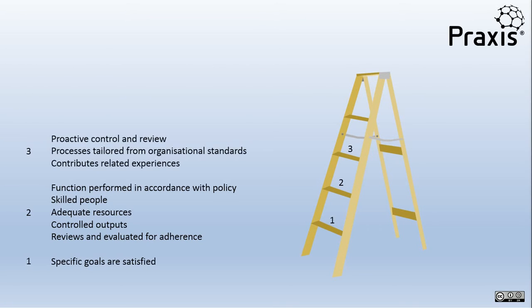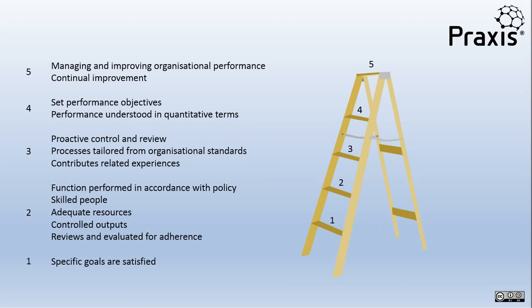At level 3 your management approach is more proactive. You will be adapting to different contexts and collecting lessons learned. At level 4 you will be setting performance targets and at level 5 you are continually improving. All of these indicators are used in a Praxis assessment, making it compatible with the CMMI approach.